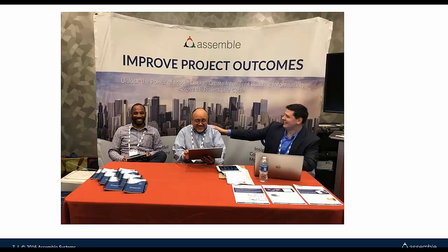So Curtis, you want to say something? Hi, this is Curtis. Yeah, so like Tim said, I came to him a couple of years ago to start tracking production on our projects. And one of the things that we wanted to do is structural steel. And in order to get that information from the field to me, we had to have our superintendent go out and take pictures and mark up on 2D plans and relay that information back to me so I could input that data into Assemble to track the production of the steel erection.